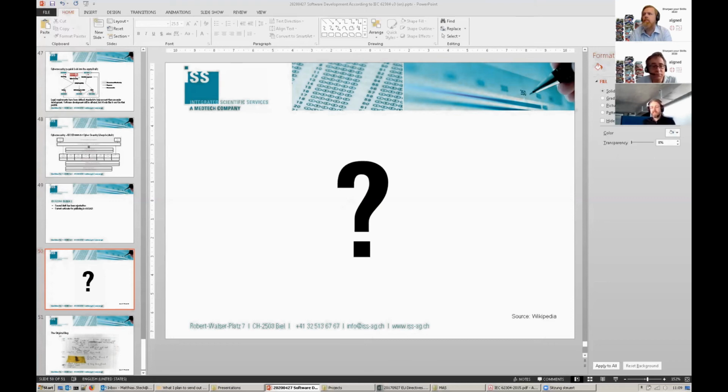With agile, that's always pretty company dependent on how the processes already exist. With us, we usually do it ticket based, where basically every change has to lead back to a ticket which has to have a reason for existing, like there's a change request from the whole product, there's an issue that came through the software problem resolution process. But all in all, it becomes a bit tricky.